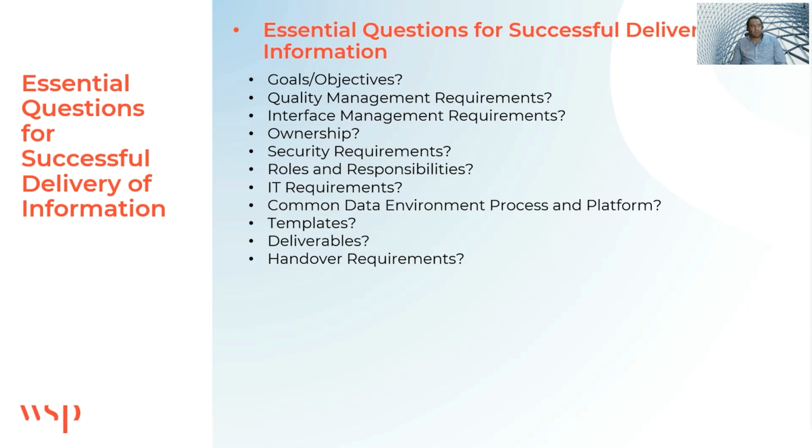What are the goals or objectives for using BIM or for delivering this information? What's the quality management requirements? So how we will manage the quality of the deliverables? What's the interface management requirements? How the interface between different parties will be managed? The ownership of information.